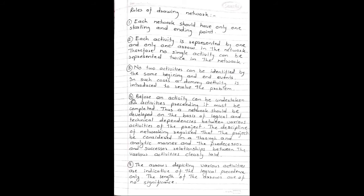Fourth rule: Before an activity can be undertaken, all activities preceding it must be completed. Thus, a network should be developed on the basis of logical and technical dependencies between various activities of the project. The discipline of networking requires that the project be considered in a thorough and analytic manner and the predecessor and successor relationships between the various activities clearly laid out.